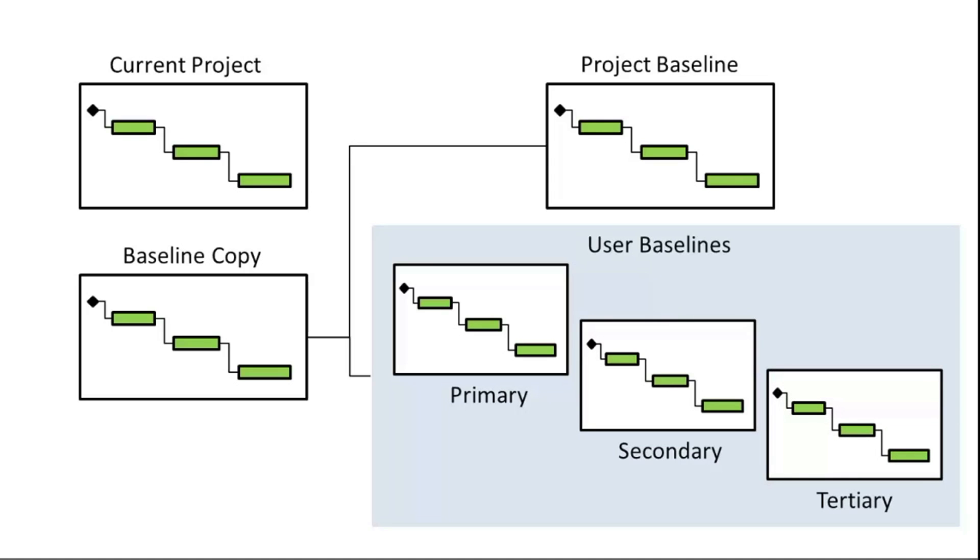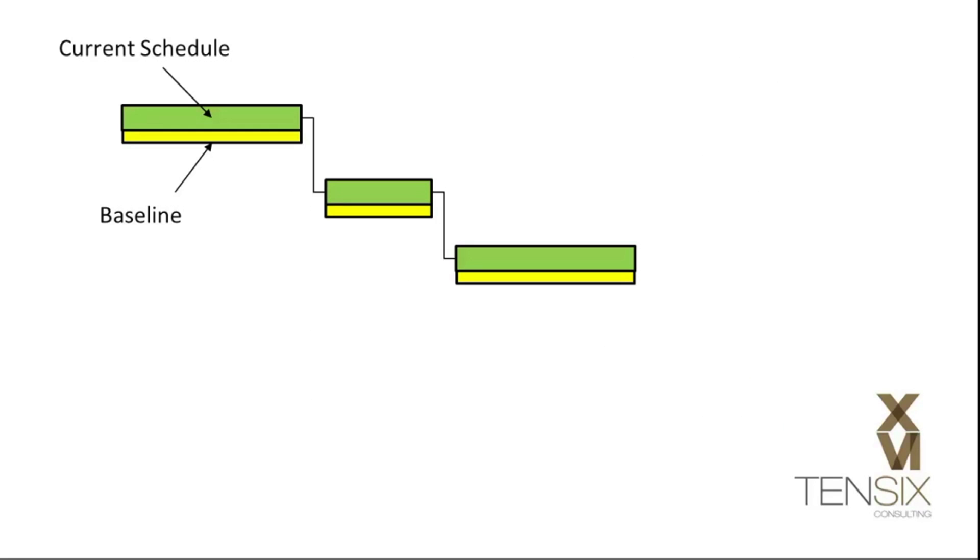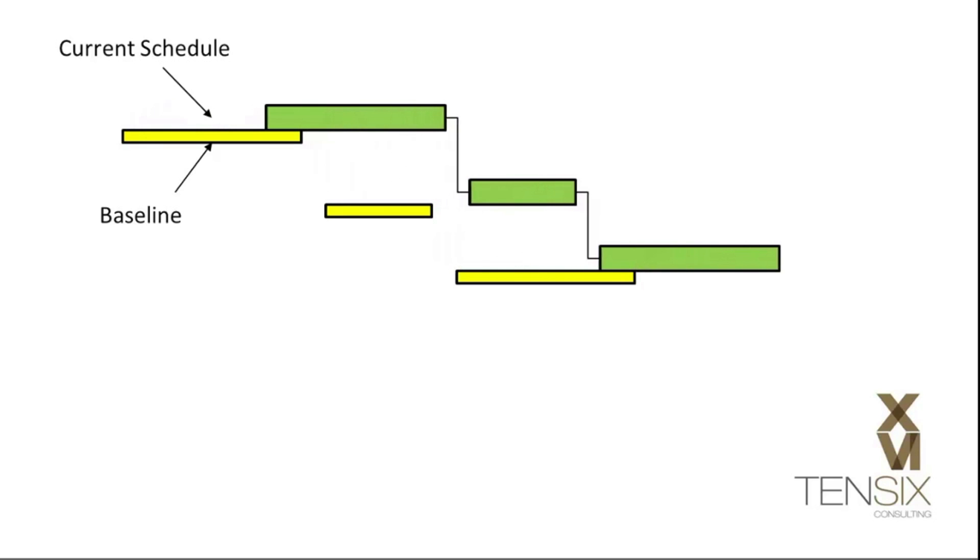When you create a baseline and assign it to your project, it functions as a frozen copy of the schedule. As the current schedule changes, you can compare it with the baseline and see differences in dates, durations, costs, and so on.